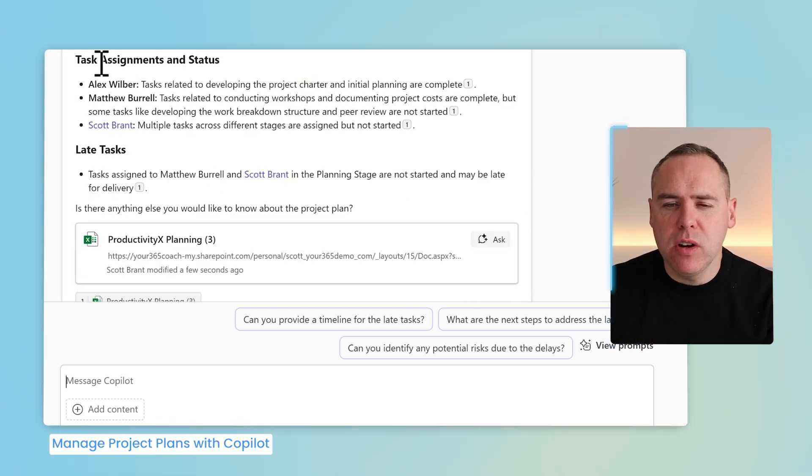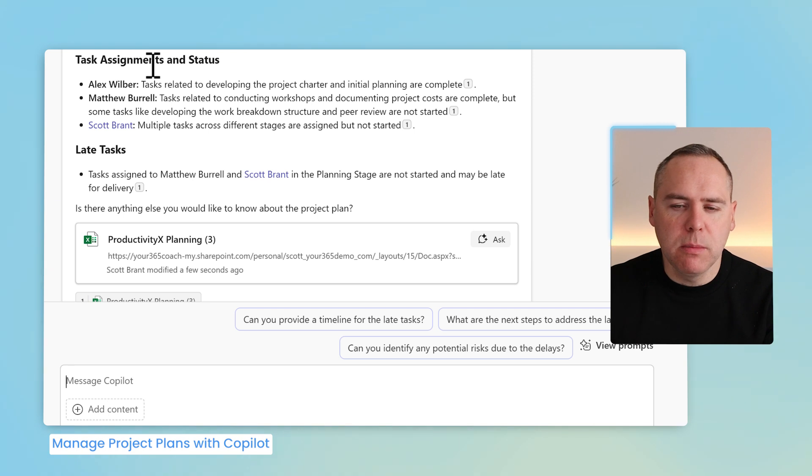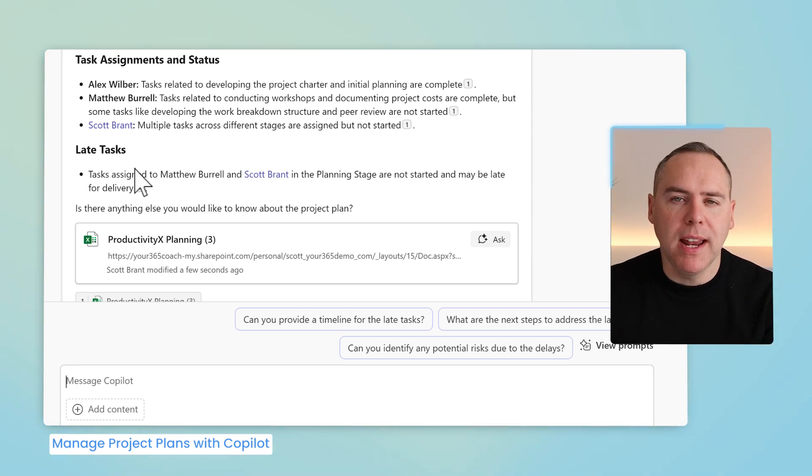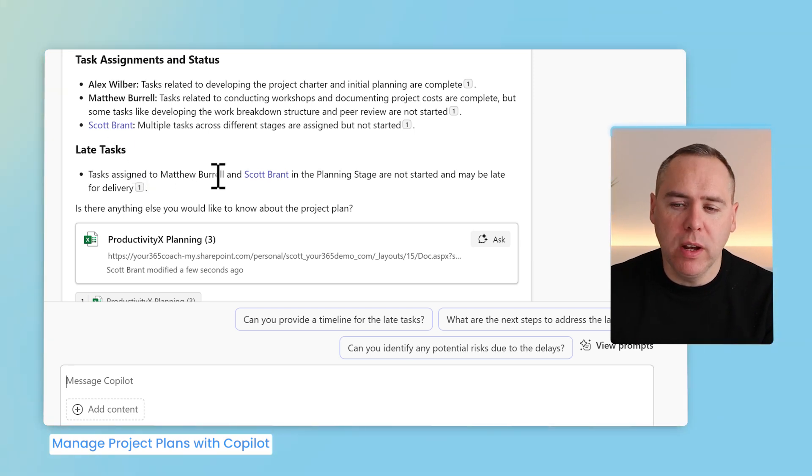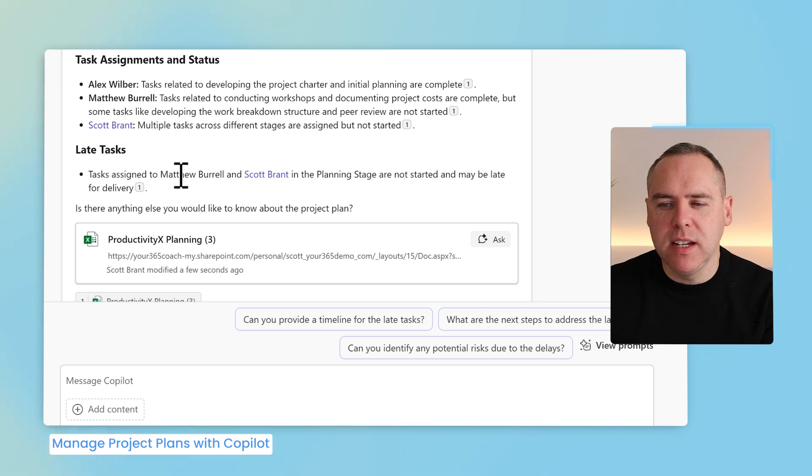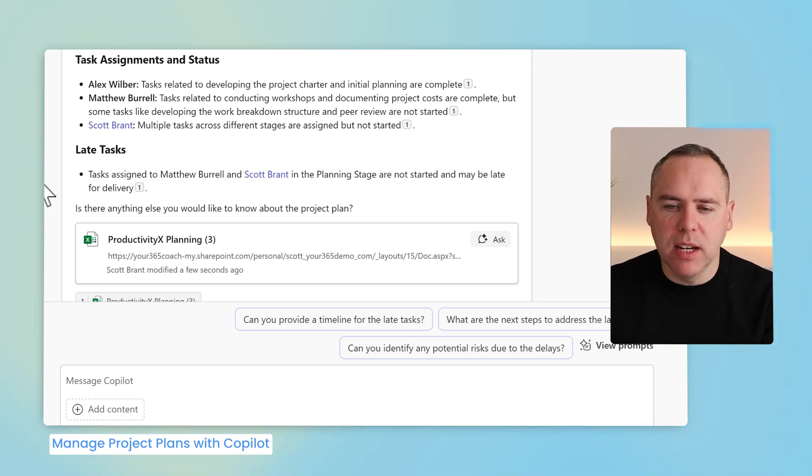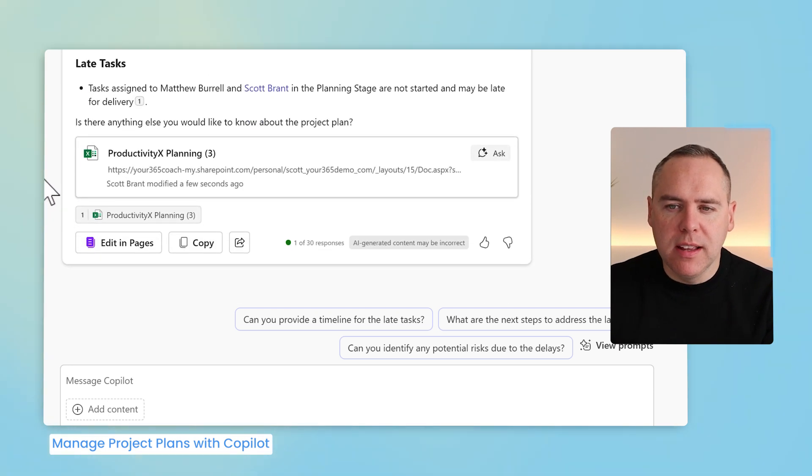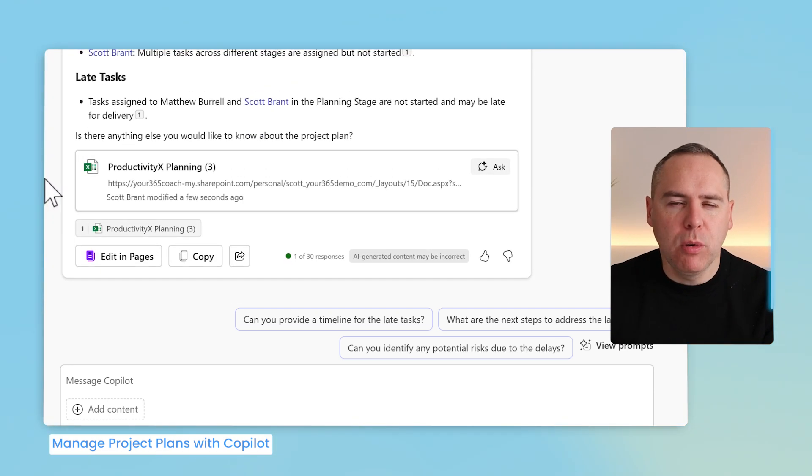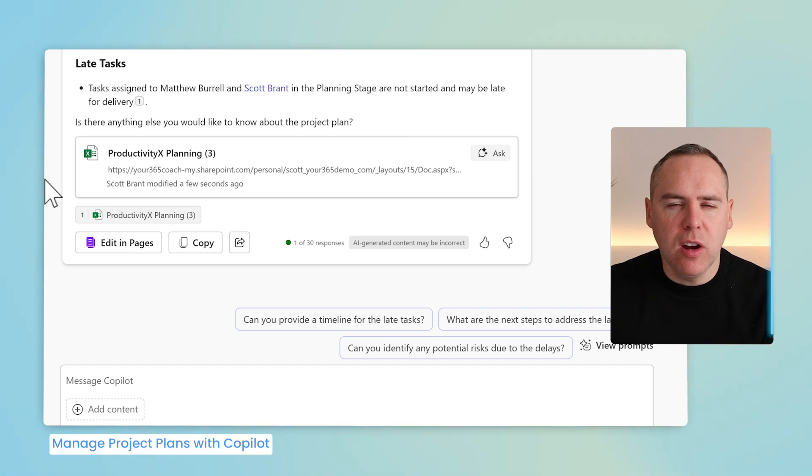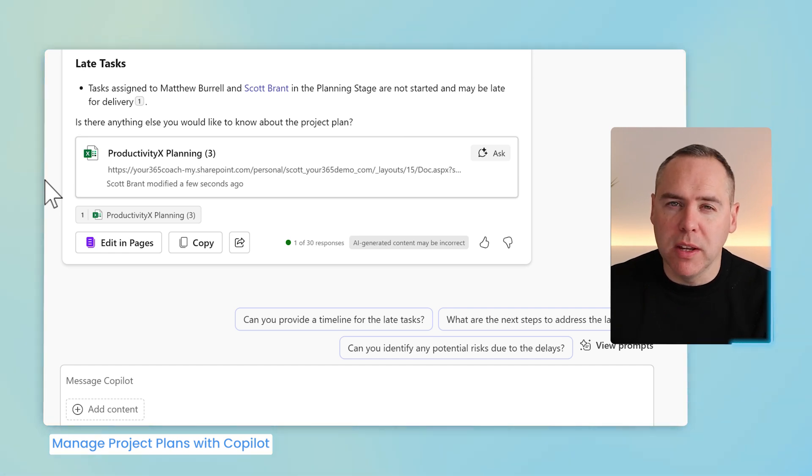Alongside that, it even shows us task assignments by status and summarizes that and also some late tasks that I and Matthew are working on which have not yet been started and may also be late for delivery. So as simple as that, we can now take your project plan into Copilot and have it summarized for you.